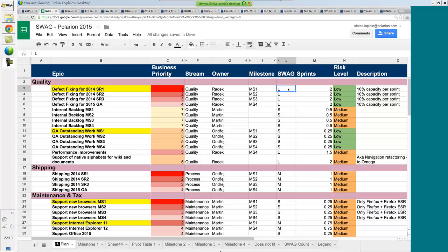We have different t-shirt sizes. The reason we pick t-shirt sizes is that we try to avoid direct conversion rates between the base or the story point and the t-shirt size, so people do not make too many assumptions around deliverables. There are obviously certain ways you can make relations, but they're not mathematically calculated. This is the reason we do it.